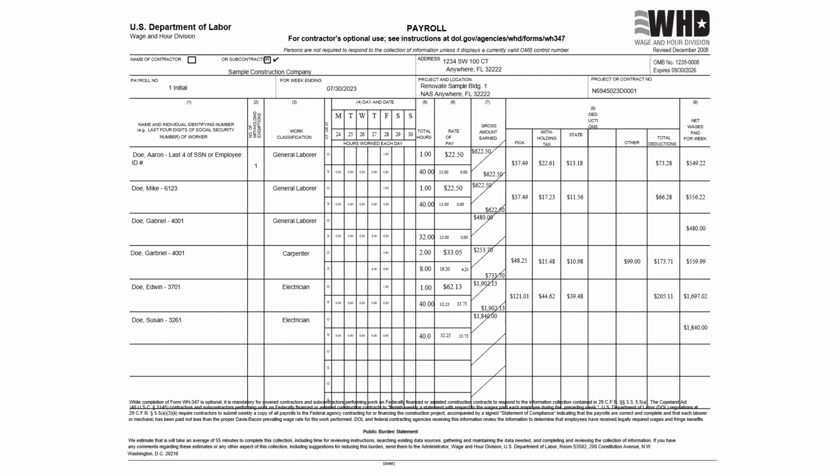Block 5, you specify any overtime and straight hours worked on the project. Note that hours worked must accurately reflect overtime and straight time hours worked under this contract. Block 6, you list your hourly wage rate and fringe paid in cash, not those paid to plans.